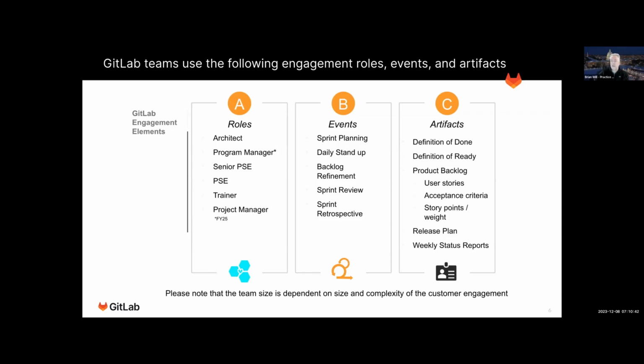And then ultimately, at the end of every sprint or iteration or milestone, you should do a sprint retrospective and say, hey, what worked well, what didn't work well. Especially on longer term projects, that's important. If you have a real short project where you are done in 4 weeks, those sprint retrospectives probably aren't that useful. If you're on an engagement that lasts 3, 6, 9 months, then that's more important because you want to make sure that you learn as you go.